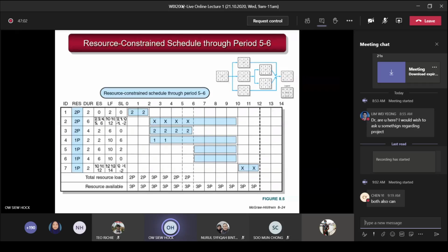Because activity 6 here has 0 slack, it is the next eligible activity. You have -2, 2, and 0. So -2 loads first, which is activity 2, followed by the 0 slack, which is activity 6. So now you load activity 6 into the schedule using rule number 1. The programmer limit of 3 is now reached. So you delay activity 5, and you update the early start to become 7 and the slack becomes 1.